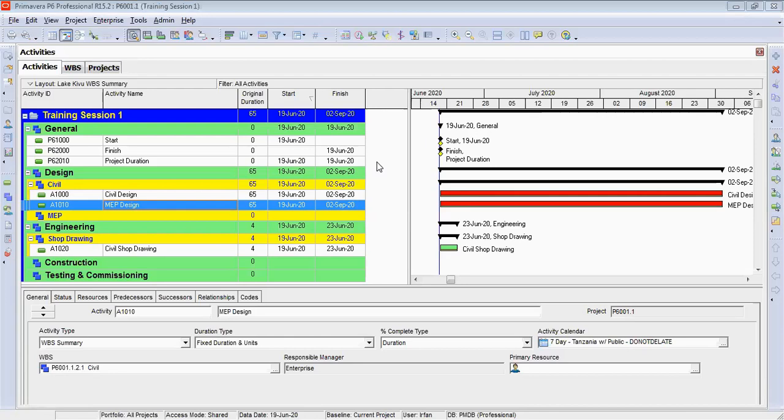So resource level activity is dependent on the resource calendar. We assign an activity calendar and a resource calendar in our program. The calendar topic we will also cover in the next stage. For example, you have one resource, and this resource is working during the night time only. So during the night time, it is not your normal activity calendar timing. Your normal activity calendar timing is, let's say, from 7 to 5.